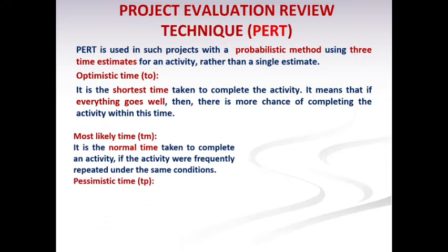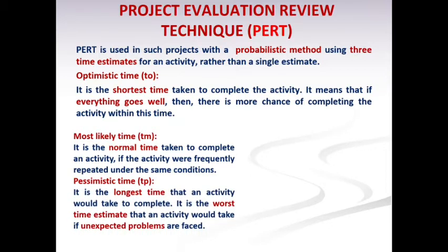Next is pessimistic time. It is the longest time that an activity would take to complete. It is actually if everything goes wrong. That is the longest time that an activity would take to complete. It is the worst time estimate that an activity would take if unexpected problems are faced.